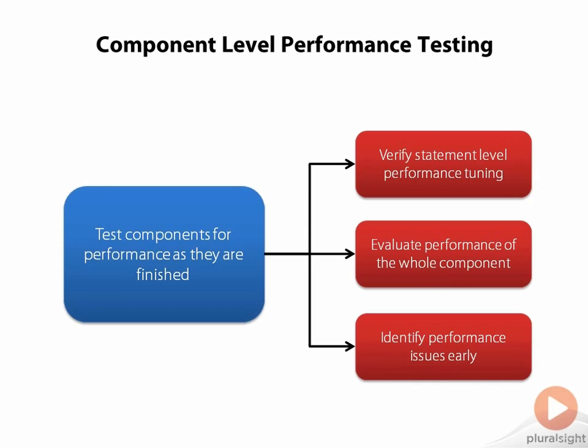As you work through designing and developing your application, recognize places where you have complex SQL statements, statements that run against tables with large numbers of rows, search type functions, or areas that have had past performance problems. Prioritize these statements and components to be analyzed and tested early in your project lifecycle so you can identify and address any issues that may come up.